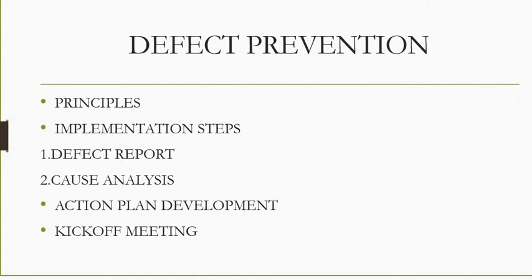Information presented during the meeting includes a description of the process for this stage, including specific procedures, methodology, technology, tools, guidelines, conventions, checklists, etc. The inputs available for this stage, examples of outputs that should be produced, the validation methods that will be used, the common error list, a list of the errors commonly created during this stage, the team assignments, and the schedule that will be followed.